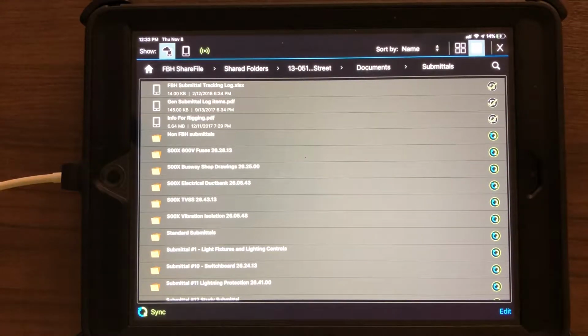As most of you guys probably know, for every job that we do, before we buy a lot of the bigger equipment and more expensive stuff, we usually have to send a submittal to the general contractor, who then sends it to the architects and engineers, where they take a look at it. It's basically a detailed cut sheet of exactly what we're going to provide for the job, and that way they can review it and know if what we're buying is exactly what they want before we actually buy it.